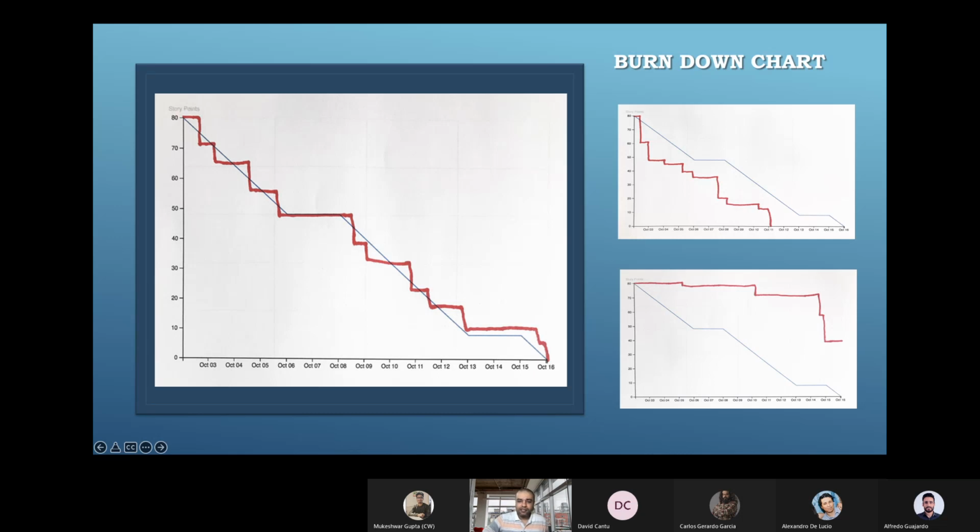So this is how you can see the x-axis and y-axis. In the y-axis, you can see story points. It is not number of hours. Again, let me clarify, this is not number of hours. This is story points. So in one specific sprint, the team velocity is, suppose, 80. So they have taken 80 story points. And within the 80 story points, you can see October 3, October 4, October 5. So it is a sprint of 2 weeks. So sprint length is 2 weeks.